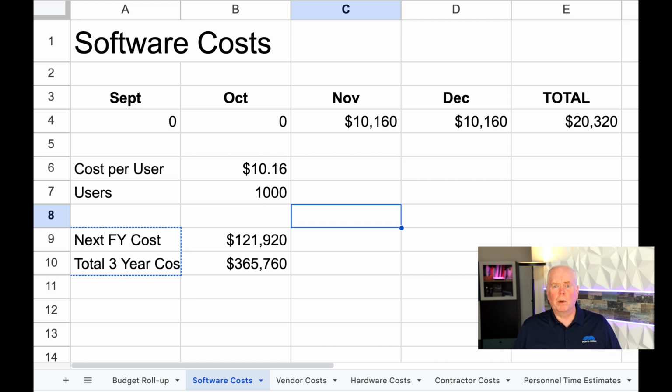So in the 4-month window of our project, the first 2 months, there's actually not even a software cost. And for the software cost for those 2 months, it's really just 1/36th for 1 month and another 36th for the next month. And so that $366,000 number drops dramatically. We're looking at just over $10,000 a month. Now, I would never just say, hey, our total software cost is $20,000. That's not a fair representation either. But during the project window, that's what the software is actually going to cost.